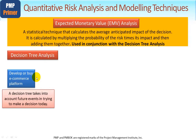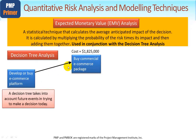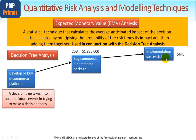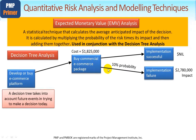With that in mind, let's look at the options. We've approached a supplier and they've advised us that the cost of buying a commercial e-commerce package would be $1.825 million. If this solution worked first time and the implementation was successful, then the risk cost is $0 — all we had to pay out was the cost of the product itself, $1.825 million. From our risk analysis and knowledge of this particular vendor creating a customized solution for us, we know there's a 10% probability that the e-commerce package may have some problems and would fail, costing an extra $2.78 million in financial impact.